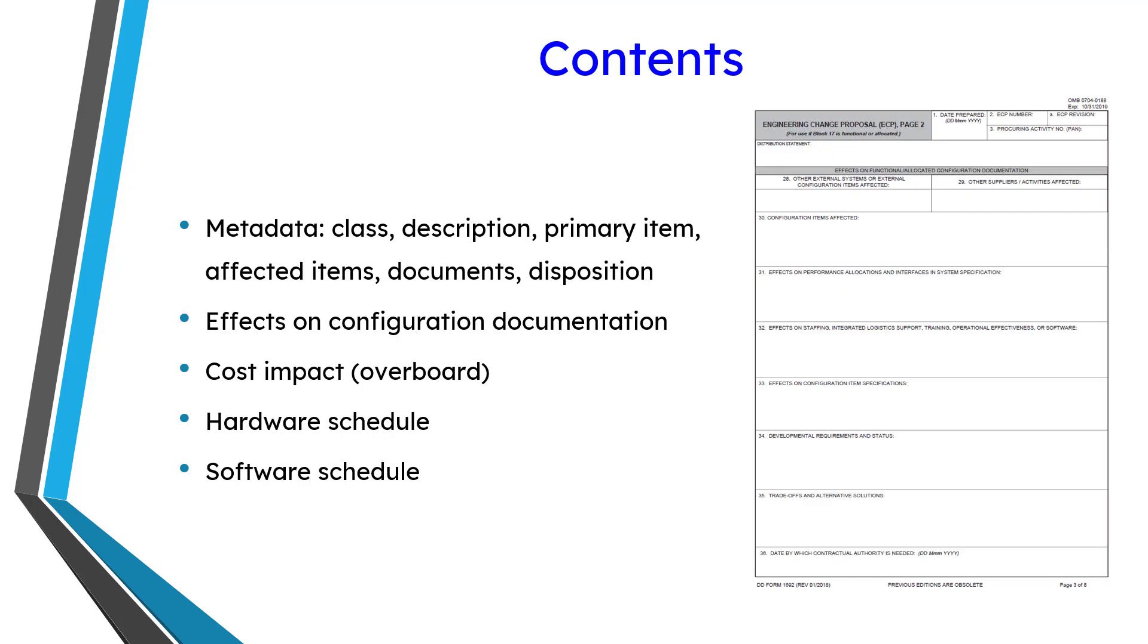So let's take a quick look at the contents. The first couple pages deal with metadata, like the class of change, and that's class by MIL Handbook 61 standards. Description of the change, what's the primary item, what are the affected items, what are the affected documents, and the recommendations and disposition of the change.